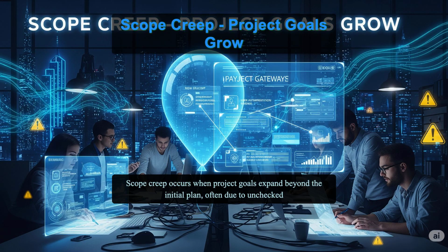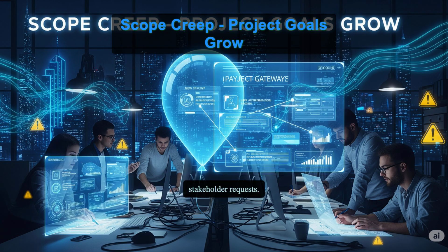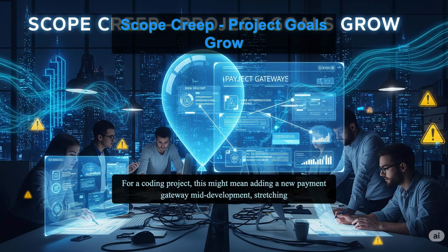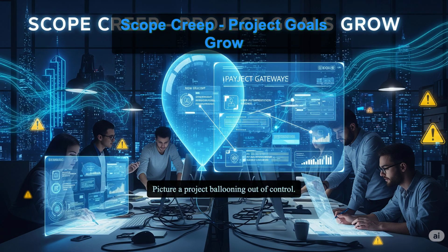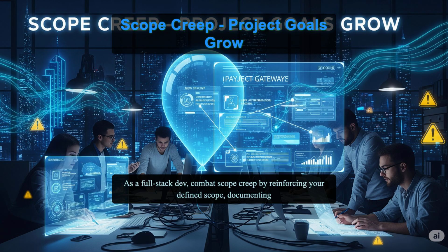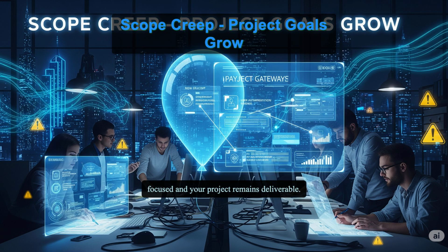Scope creep occurs when project goals expand beyond the initial plan, often due to unchecked stakeholder requests. For a coding project, this might mean adding a new payment gateway mid-development, stretching your timeline. Picture a project ballooning out of control. As a full-stack dev, combat scope creep by reinforcing your defined scope, documenting change requests, and getting approval before expanding tasks, ensuring your team stays focused and your project remains deliverable.